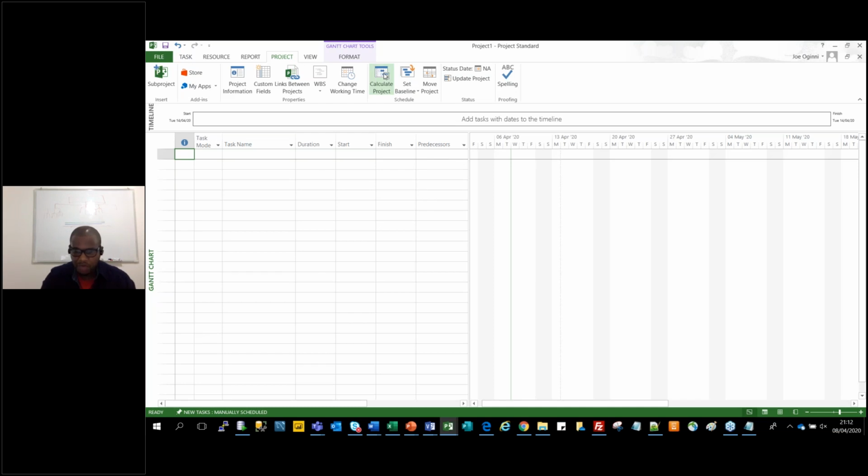Anyway, now we move on, and where we're moving on is where we stopped. We've set up our starting dates. We've adjusted the currency. We've set the time: we work Mondays, it's 40 hours a week, 8 to 5 every day. And then we ask the system to also update as we go along.